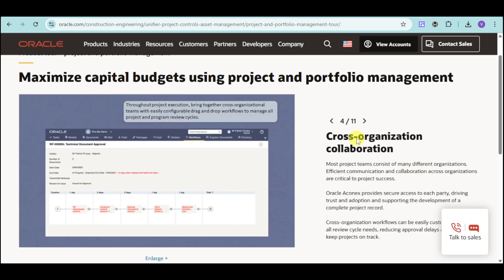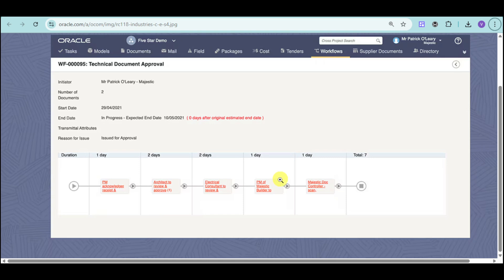They also have cross-organization collaboration. In that way, throughout the project execution, you can bring together teams with easily configurable drag-and-drop workflows to manage all project and program review cycles. For example, for the first day, you can add the project management acknowledgement receipt. For two days, you can add architects. Second day, you can add electrical consultant.